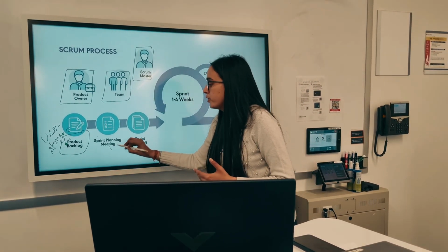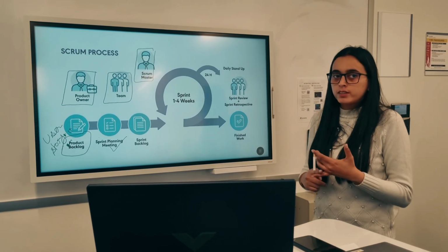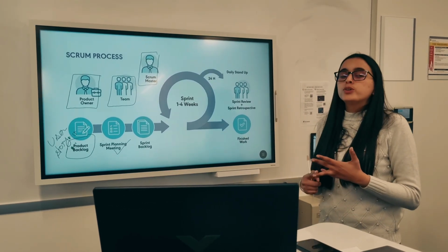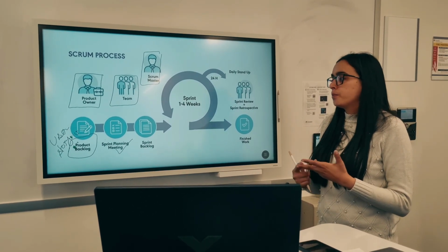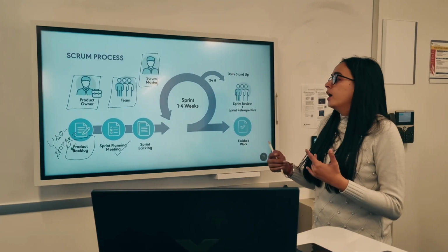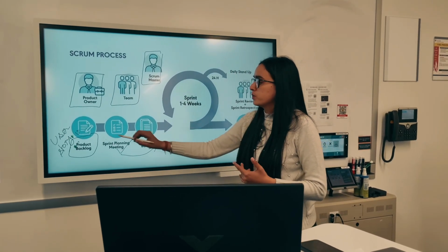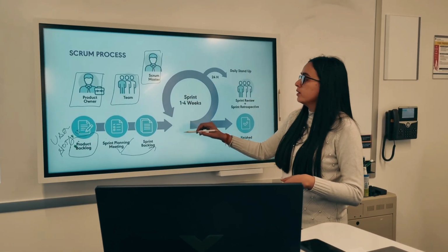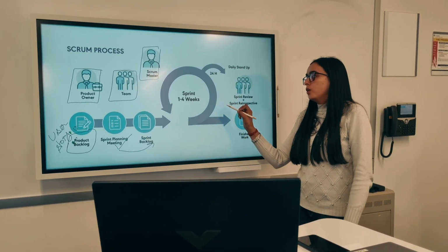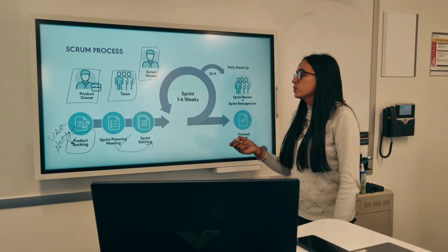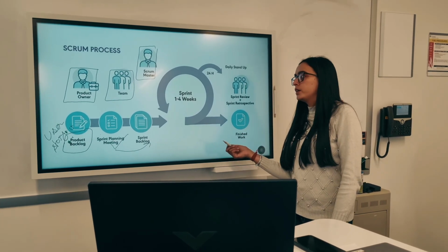So we can officially name it a planning meeting, in which they will decide how much effort is needed and who is going to work on which functionality, for example testing, development or bug fixes. And later the same user story will be moved to the sprint backlog. Once the user story is officially in the sprint backlog, then the cycle will work. It varies from organization to organization. In some organizations they have a 4-week sprint, in some organizations they have a 2-week sprint.